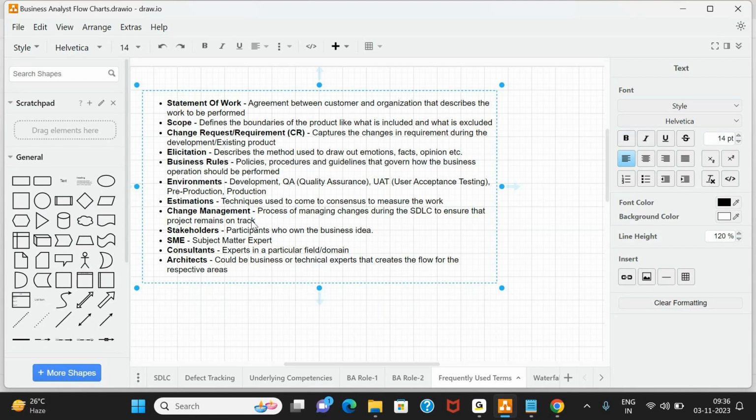The idea of change management is to ensure that I correctly identify dependencies on the change requests, priorities of the change request, estimations or timeline for each change request, how much time it is going to take for each change request, and then accordingly start working on them. Okay, so change management is a little bit on the planning side, and change request is your actual changes that are needed.